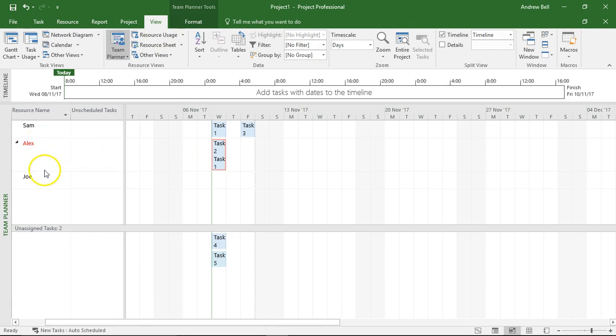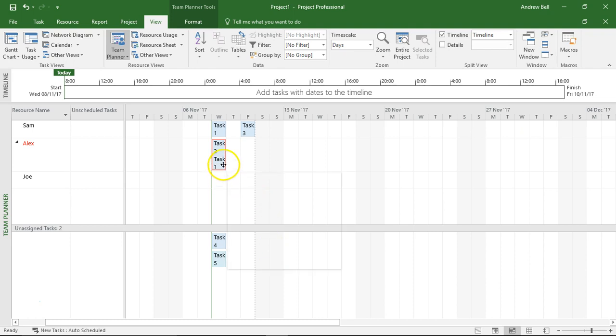Now we can see Alex is over-allocated. I've got him doing two tasks in task 1, so yeah, good benefit of the Team Planner: we can see our over-allocated resources, and I could take task 1 and drag it so that Alex is doing it on a separate day.